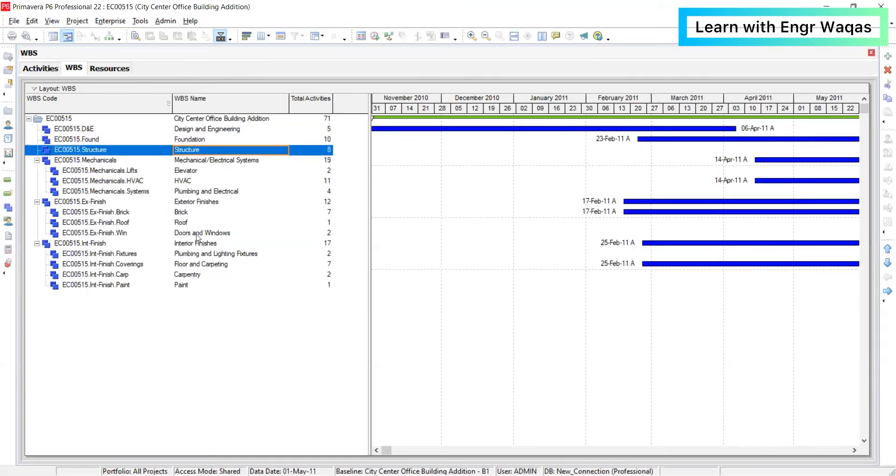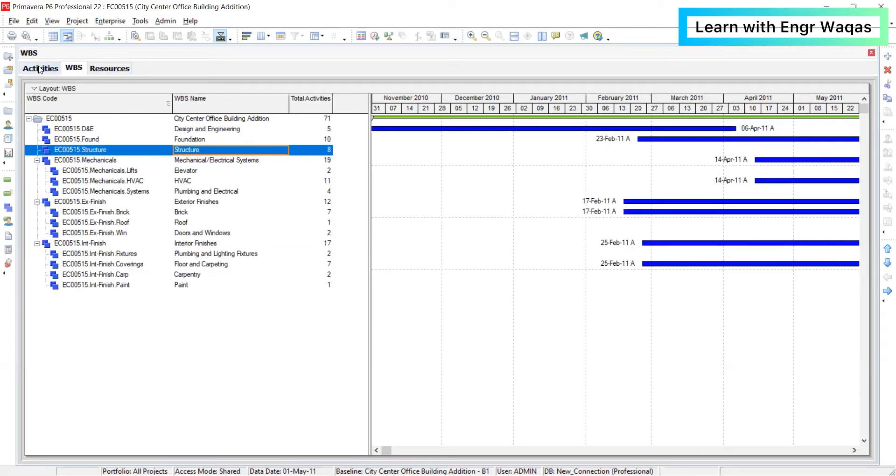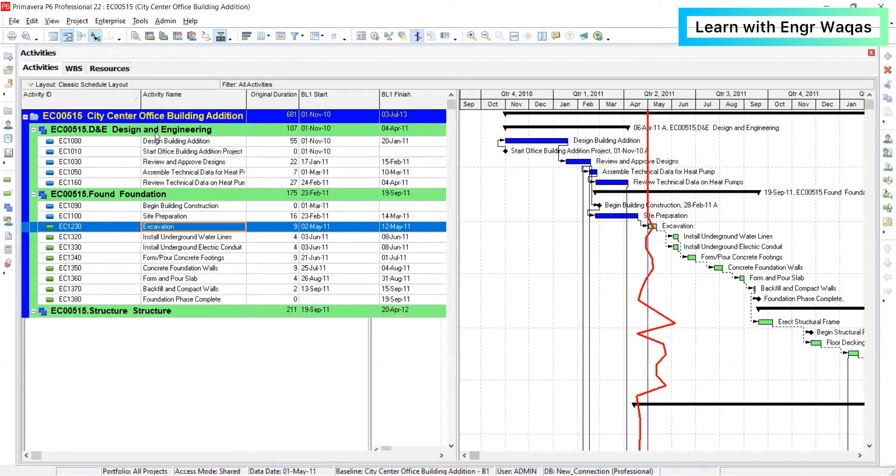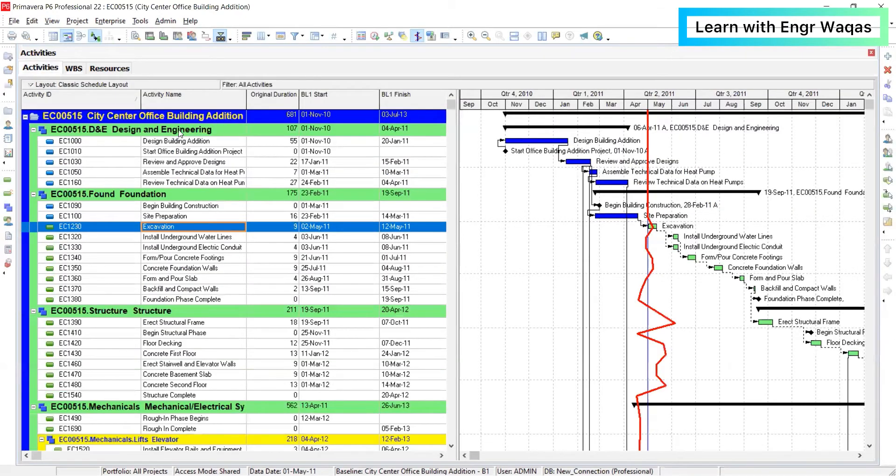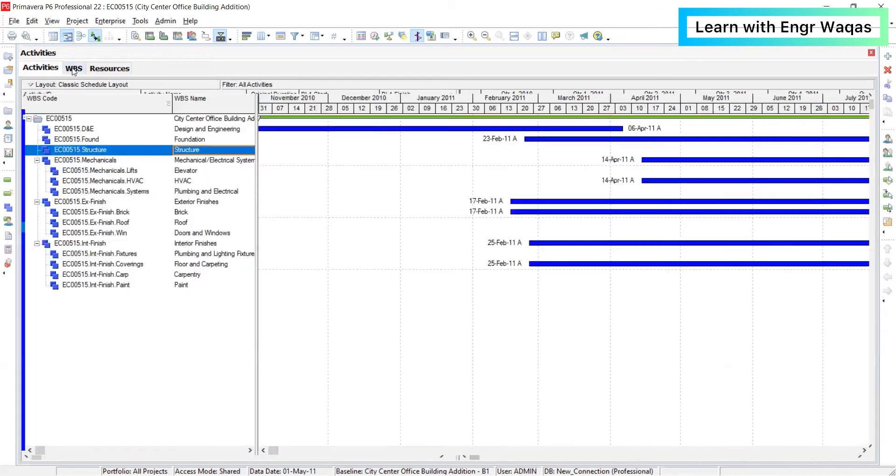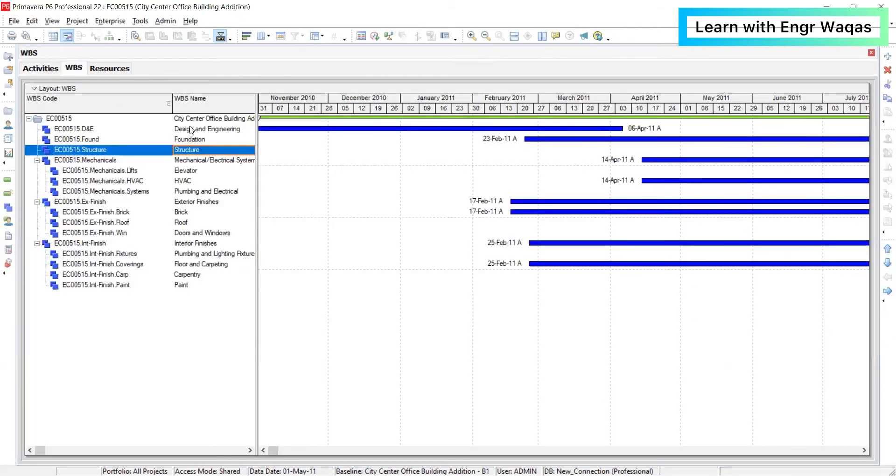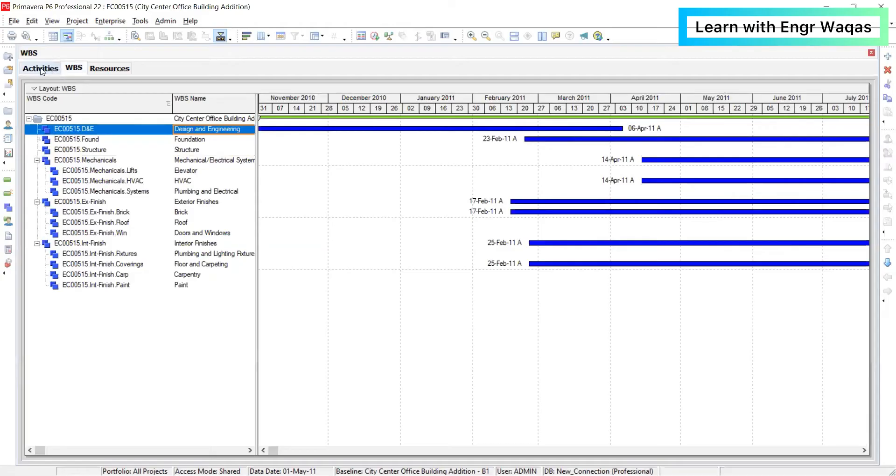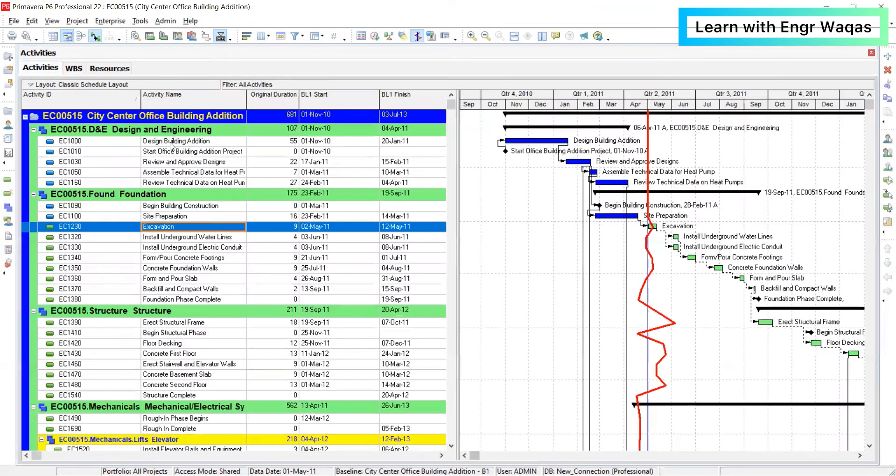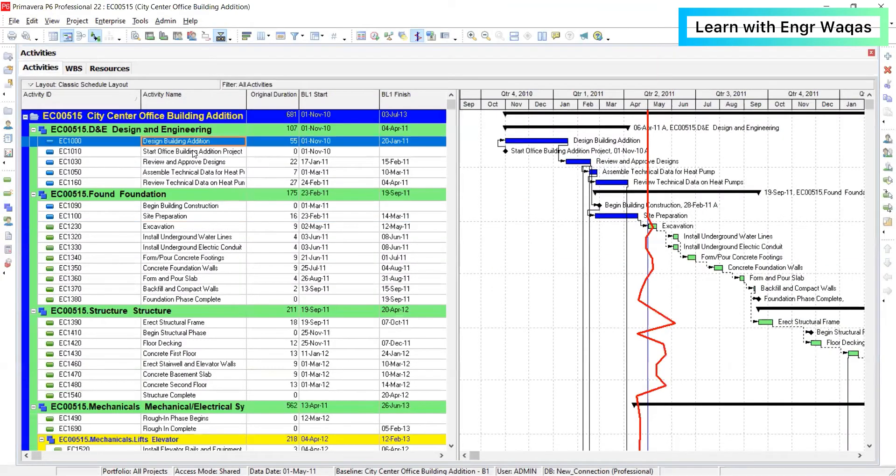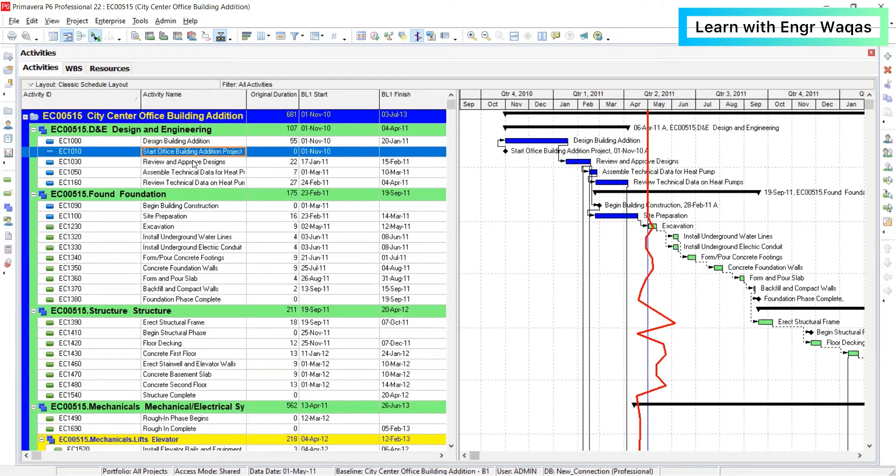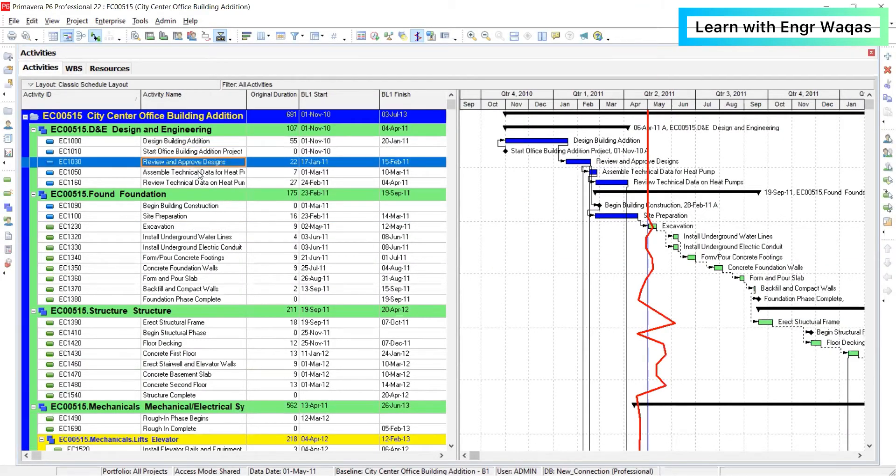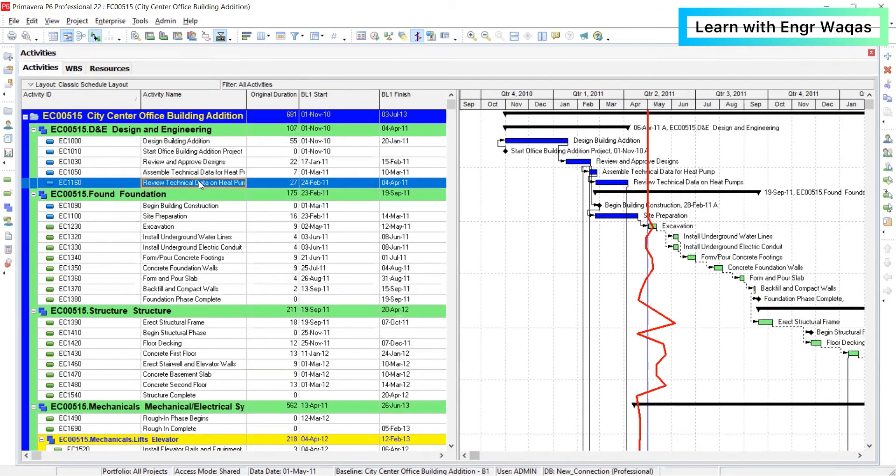You can see all these things and further breakdown—as you can imagine that you are going to read a newspaper and there are headings and then there is detail. So the same way, the concept should be memorized: that WBS is actually the newspaper heading, and the detail is here. You can see design and engineering is the heading, but the detail would be here. The smaller tasks would be incorporated as activities.